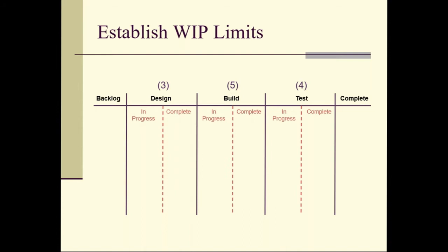So they were working on 5 items kind of in parallel, juggling the 5 items all at once. And they said, how long would it take you to do it? And they actually measured it. And the actual completion was Wednesday afternoon, the 2nd week, which was on average about a 60% cost and schedule overrun to get this project done because of excessive multitasking.